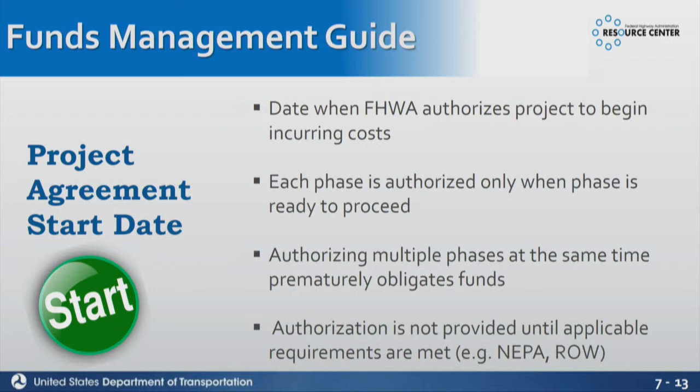We can't authorize multiple phases at the same time because it prematurely obligates funds. And authorization is not provided until the applicable requirements are met. So we're not going to authorize or obligate construction if NEPA is not done, or right-of-way if NEPA is not done.